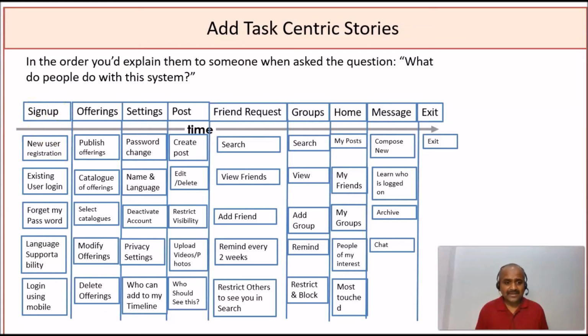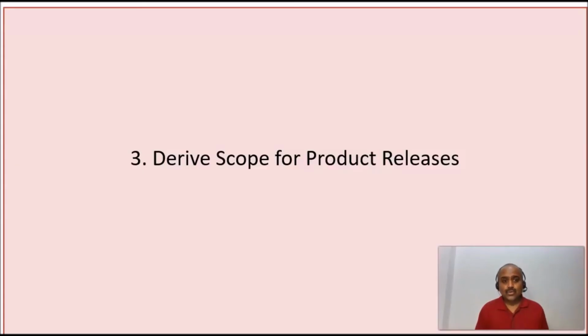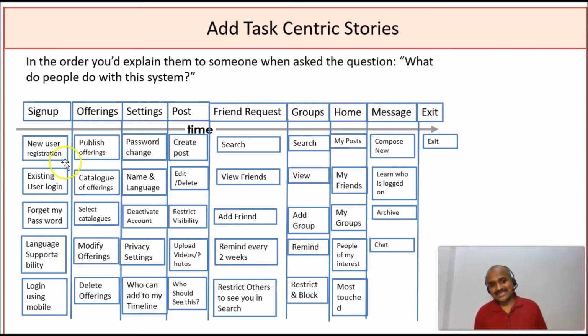So what we have done, we basically constructed a walking skeleton on the top, and then we are detailing these user stories. Now the critical thing here is we need to make sure the mandatory user stories are written on the top, and optional or less frequently used features are detailed towards the bottom. So this is how we need to arrange our user stories.